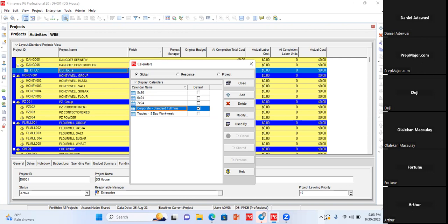Because I've told you, Omolola only work 2 days, right? And 1 person cannot complete a task. It has to be 2 people. So you have extra 6 days on top of it, that making 16 days. We all understand that. Who doesn't understand? I can repeat myself.